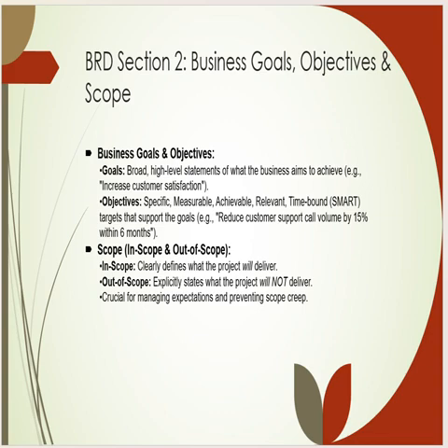And then the objective. Let's come to the objective. It's specific, measurable, achievable, relevant, and time-bound. So it satisfies the definition of SMART. SMART stands for specific, measurable, achievable, relevant, and time-bound. So all the requirements and objectives should satisfy the definition of SMART. Then the target that supports that goal: reduce the customer support call volume by 50% within 6 months. Those are the objectives. So, to provide the appropriate, optimized solution to the customers, to increase the customer satisfaction level. Those are the objectives, building such a document and such functionality. Let's move on to the next part.